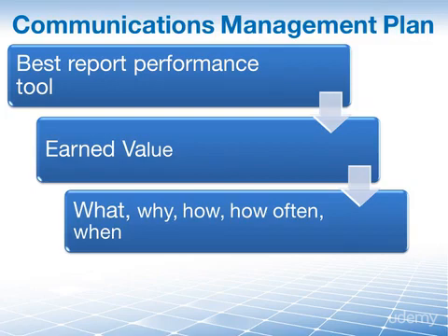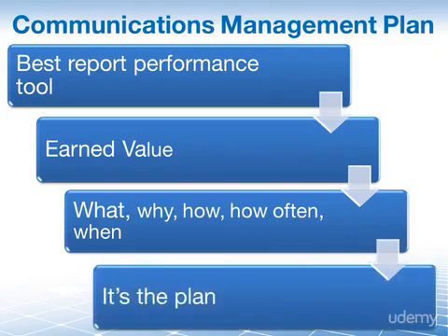How do we communicate it? For example, we send an email. How often do we do that? Well, we send it every Friday, and on a weekly basis. Every Friday is the how often and when. Yes, and all of that gets defined in the communications management plan.